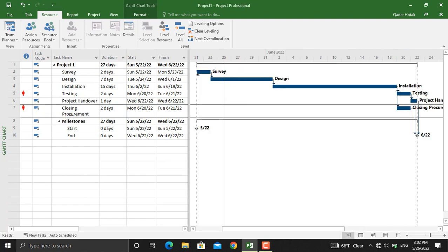As you might have noticed here, for the testing and the closing procurement, the red icons appeared which means that this task has over-allocated resources. This means that there is one resource which is working on two activities at the same time, which won't be applicable.